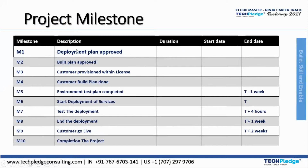Our project is divided into 10 milestones. M1 is where the deployment plan is approved. M2 is where the build plan is approved. M3 consists of customer provisioning with license. Then the customer build plan is done and your environment test plan is completed. Then you start deployment of your service, considering the time required — maybe one week or four hours — and the time needed for testing.